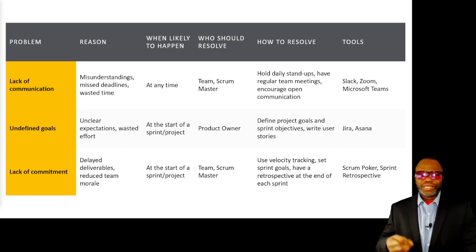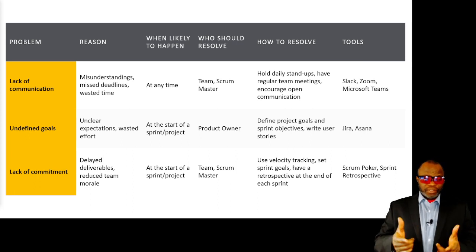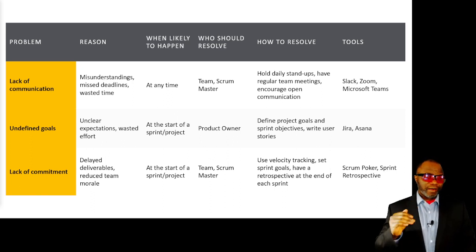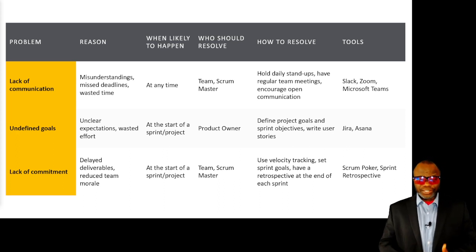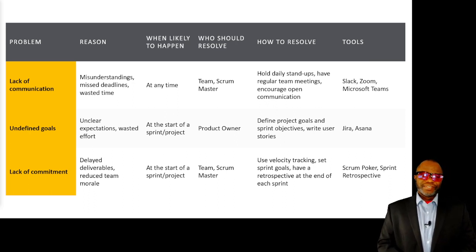So they had not really practiced a lot of Agile. I said, let's use this. Put in the format of user story, boom. They couldn't believe how quick and efficient it was. Just the RGB, the role, goal, benefit, the card, the conversation, the confirmation, just that concept, it amplified their requirements to the point that they were able to move forward on a project they were not able to move previously.